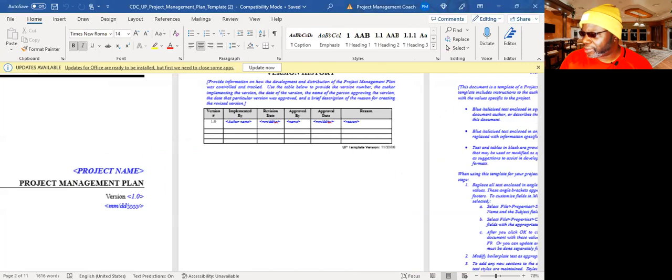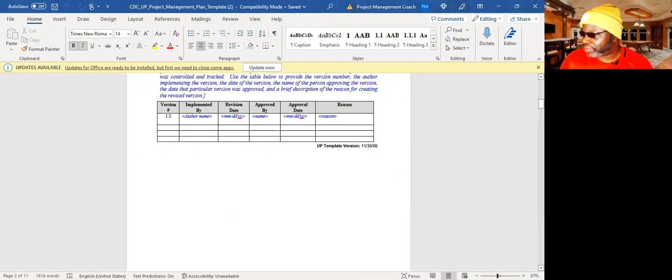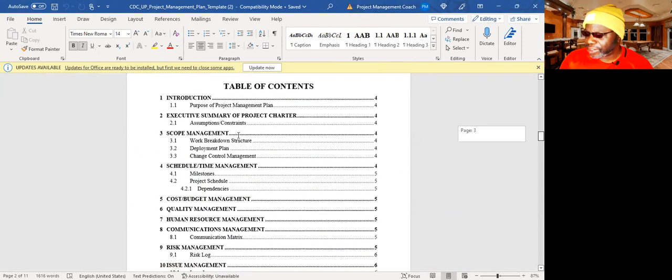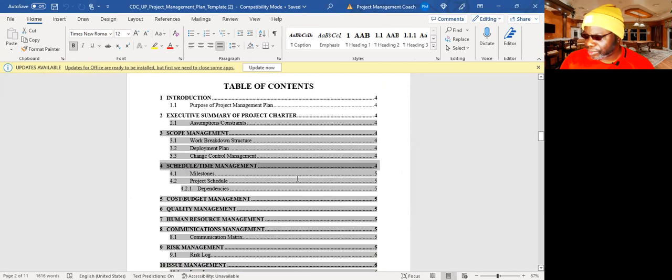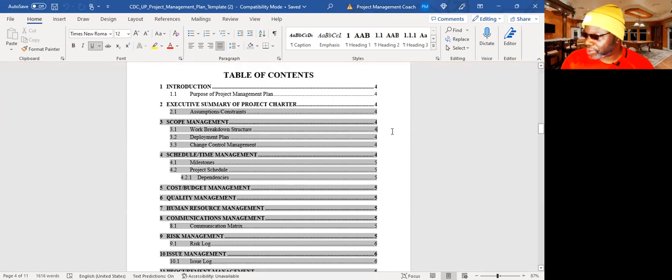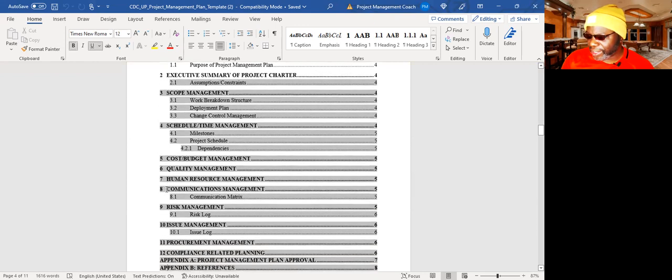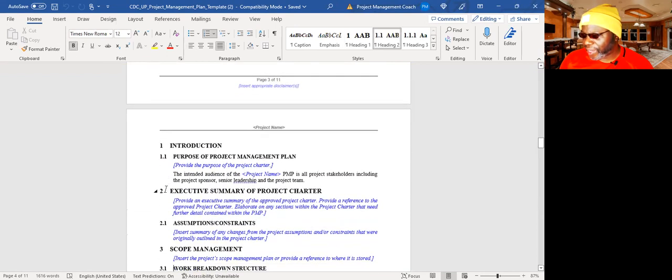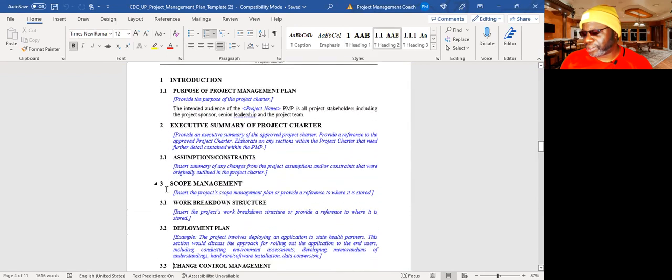And what I mean by developing the project management plan is you are going to be adding all these sections: scope, schedule, cost. You see all these sections here? All of these sections, this is typically what a project manager would need to do in develop project management plan. You need to collate all of the subsidiary plans into this final, as it were, document.